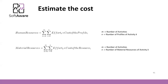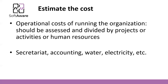After calculating the human resources and material resources for all the work packages, you should also take into account operational costs. These are secondary activities that support the main activity of the project, like water, electricity, space, paper, and printing. The approach here is to calculate all the operational costs over one year and assign a percentage of those operational costs to each project. You could also use activity-based costing to assign secondary costs per activity, but that takes much more effort and time.